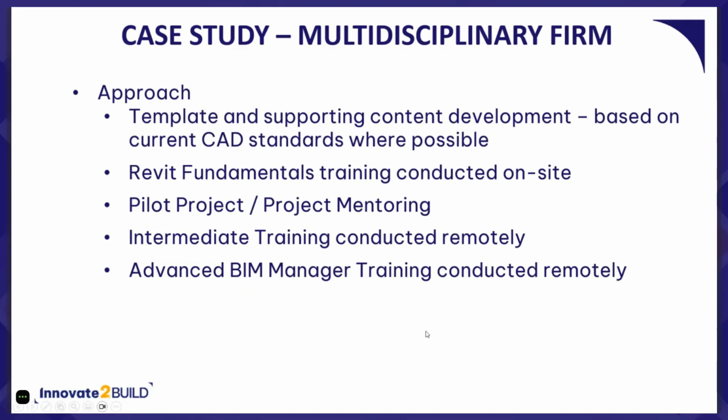So the approach we took, again, very similar, except on a larger scale. We did some template and supporting content development, again, based on the current CAD standards. We did Revit fundamentals training, conducted on site. Even though at this time we were doing most of our work remotely, these people wanted us on site, and we were happy to oblige. And frankly, I think that works out better if you can. We did a pilot project with some mentoring, and then we did some intermediate training, which we conducted remotely. That went well. And then we also did some advanced BIM manager training that we did remotely.